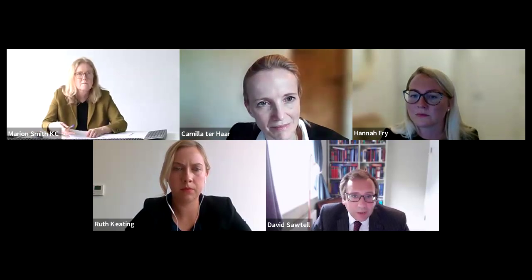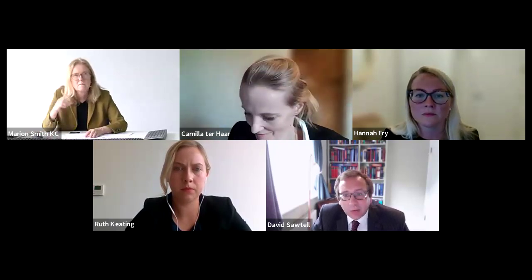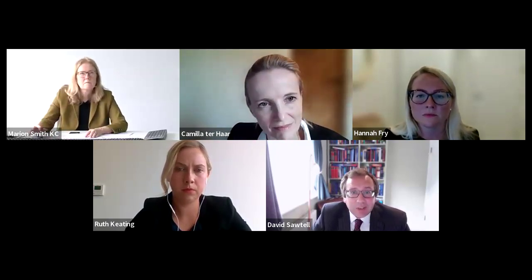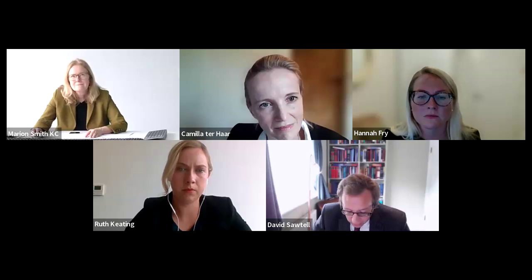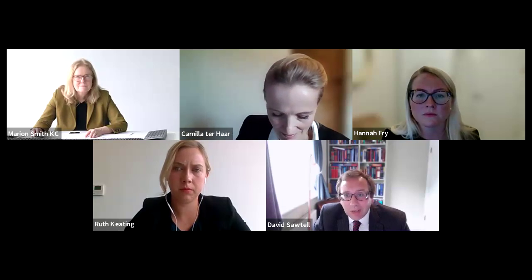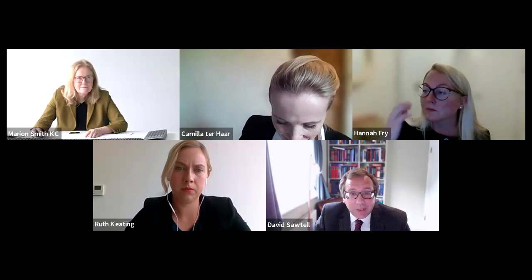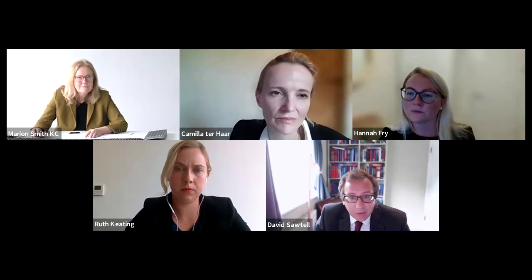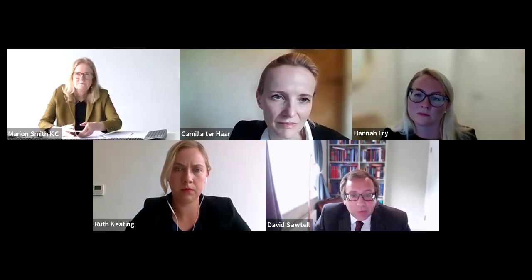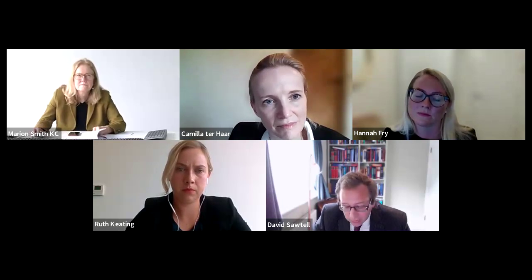Even more worryingly, there's nothing in the JCT contract now yet that says if you find something that's a statutory divergence under 2.1.5, say you realise that actually instead of being better insulation, you need to install safer insulation. Nothing here says how you allocate time or money. So that's a real problem. It's a real weakness from a JCT form. How would you get around it?